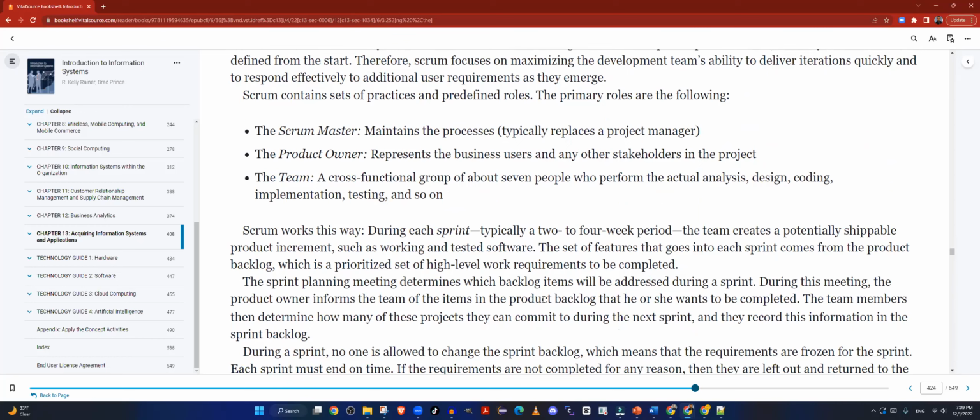And one of the other things the Agile development approach asks is that every day the entire team has to meet in the morning, maybe for 10 minutes, where everybody will answer 3 questions, only 3 questions. Everybody will answer: What was your plan for yesterday? And did you complete it? If not, why not? Okay, the 2 questions done. The third one is, what are you planning on doing today? What's your goal for the day?